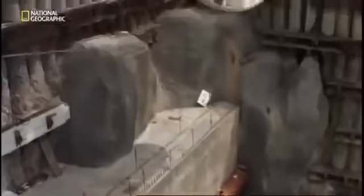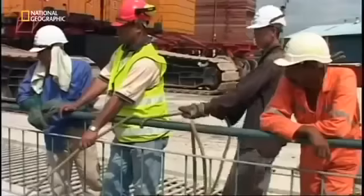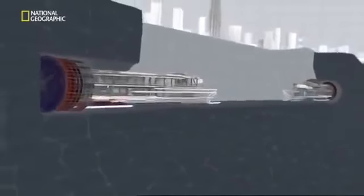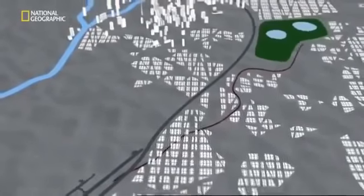May 2004, the second TBM arrives. Any major damage would require custom repairs in Germany and set the project back months. From this staging zone, the plan calls for 2 TBMs and their crews to dig outward. One team will head south to the Karayong River. The other will link up at the Klang River to the north. The job requires the tunnelers to work round the clock for nearly 3 years. It will push the men and machines to the limit.